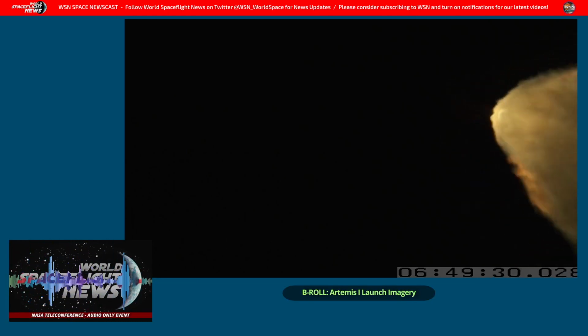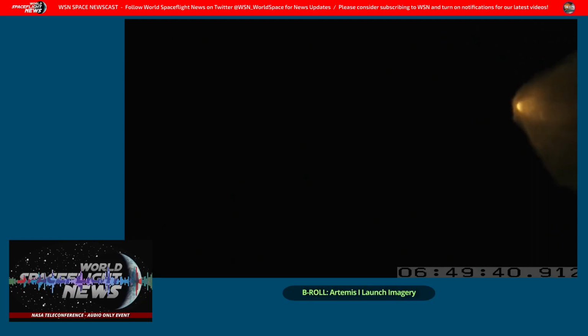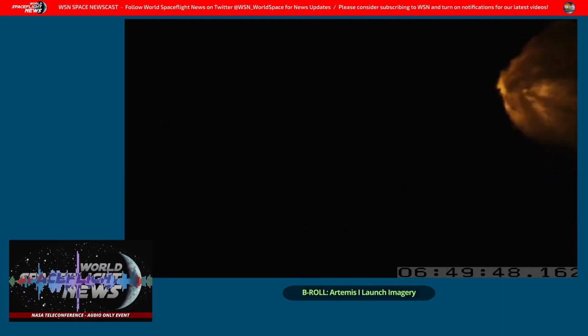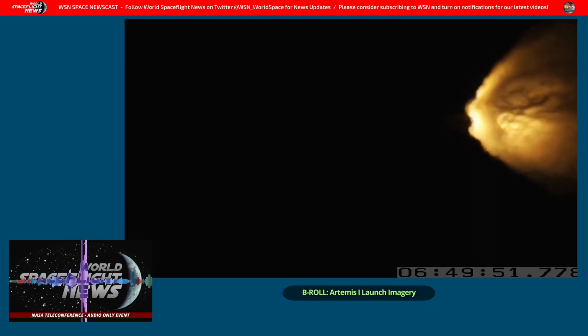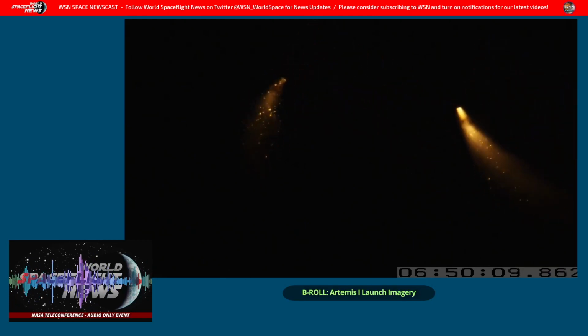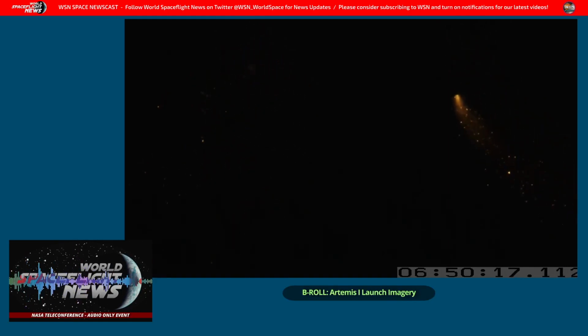Yeah, thanks, Alicia. I know that the EGS team and the SLS team have talked with ASAP about it. I've talked with ASAP about it. I think we'll continue to implement changes, but we implemented changes immediately thereafter, like making sure Charlie made sure we have enough time for our teams to get the updated procedures. We were changing procedures as we learned how to load the vehicle. We took a step back and said, let's make sure we have some time to look through the procedures with John and his team. Let's make sure we have time to practice the procedures, that they're implemented the right way, where we went from manual to automated, where we could automate things, and we took time to test those procedures.